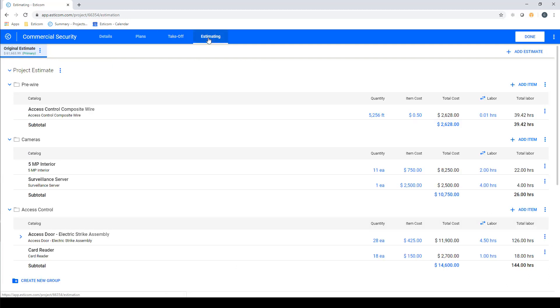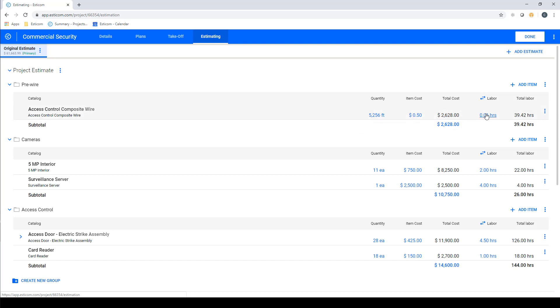Now let's move over to the estimating section to review our quantities, material pricing, and labor rates. Here you can see our estimate broken out by the grouping we set up earlier, with the parts and assemblies displayed with quantities, material cost, total cost, and total labor extended out in hours.